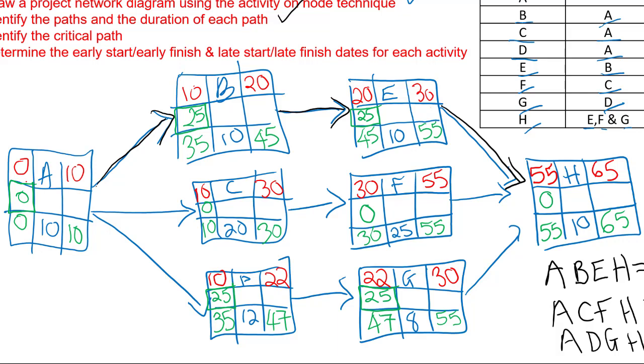So what this is now telling us, for example, with B, is that we have 25 days or weeks, whatever that duration is done in, to play with in order to get activity B done. So as long as we start no later than on day 35, we can organize how we schedule activity B. And the same for activity D down the bottom.